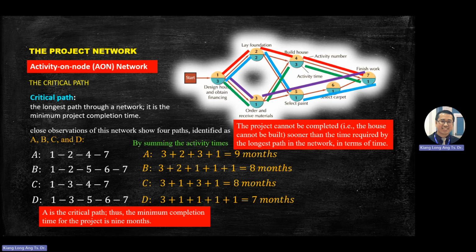Okay. There are 4 methods to identify critical path. This is method number 1. Very traditional, very slow method. Okay. In test, very popular question. We like to ask you what are the method or methods to determine critical path. Method number 1, later I will give you the answer, but method number 1 is calculate, identify the path, then calculate the maximum time.